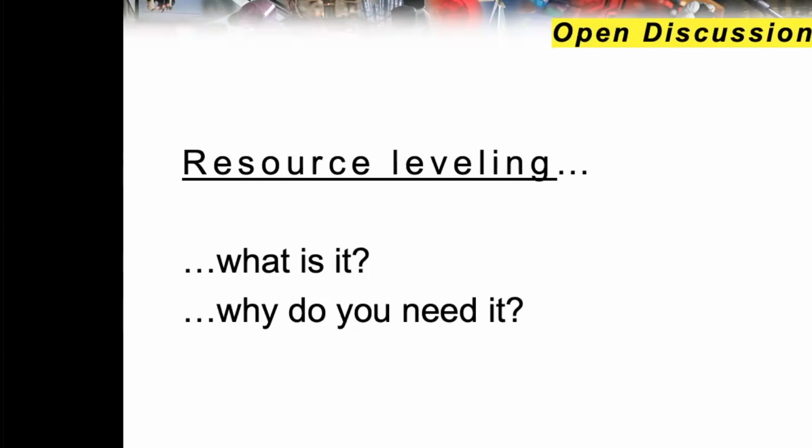These are all resources. And in your project, there will be times that maybe more people or more teams want to use it, right? Maybe in your PERT, there will be some moments that when you get a snapshot, more people might be working on that machine, or maybe you have a software engineer. And then in some parts of the activities in your PERT, maybe more than one node need a designer. So all these things require you to look at your activities and try to understand where is the overload, right?